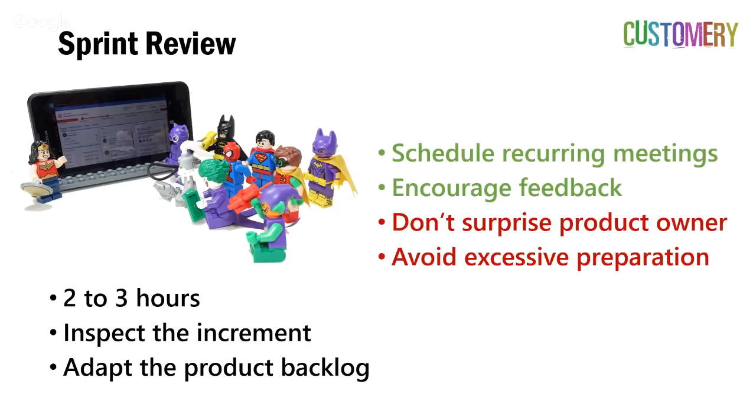The sprint review should be no more than 2 to 3 hours. Most of my sprint review workshops are actually much shorter than that. Even if it's a 2 or 3 week sprint that I'm running, 1 or 2 hours is normally sufficient. A couple of tips for running your sprint review. I would encourage you to schedule recurring meetings. Sprint review, in my case, needs the conference room. Right? It's a really hard room to secure, so we try and book it months in advance. It's the same Tuesday morning every other week, so it's in everybody's calendars, particularly our stakeholders, so that they know exactly when they can come along and see the latest features and give us their feedback.